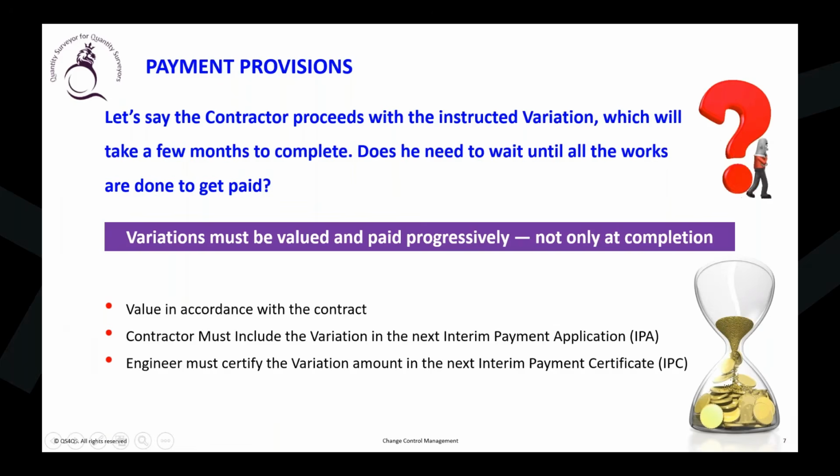The engineer also cannot hold the entire payment until the works are complete and the rates agreed. You might have a dispute on the rates, but you have to pay some amount to the contractor using an on-account payment or any nominal payment for the cost they are incurring for the ongoing works.